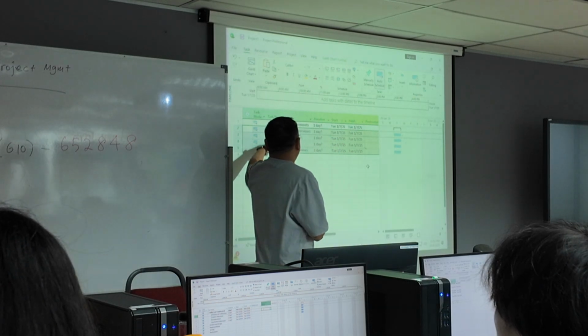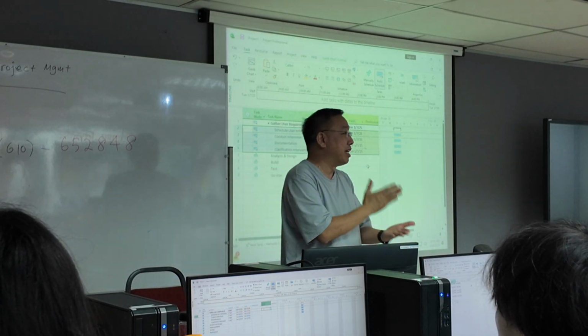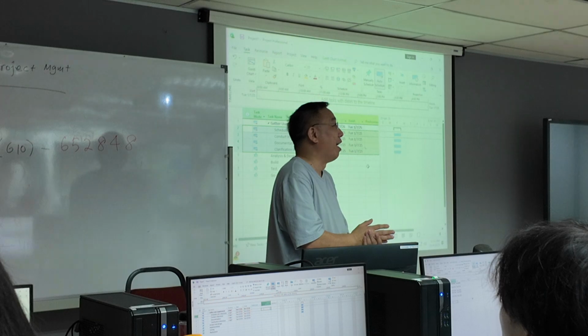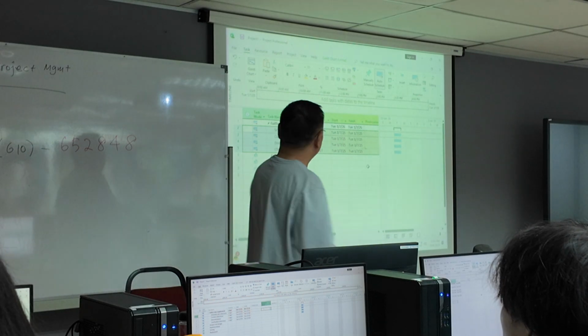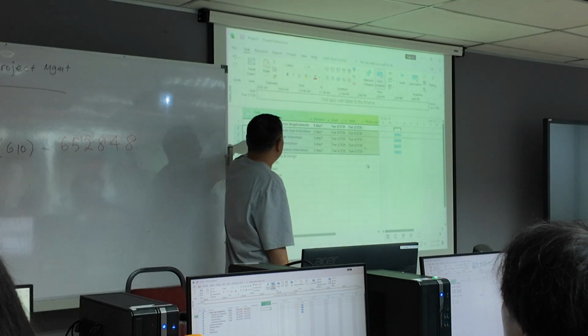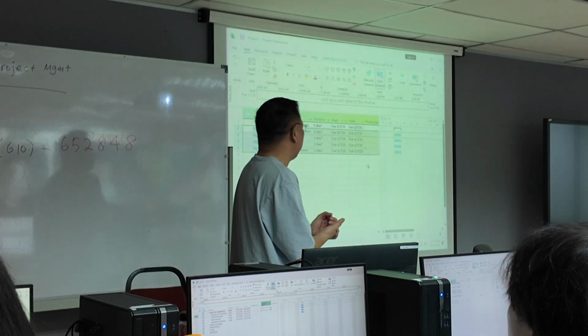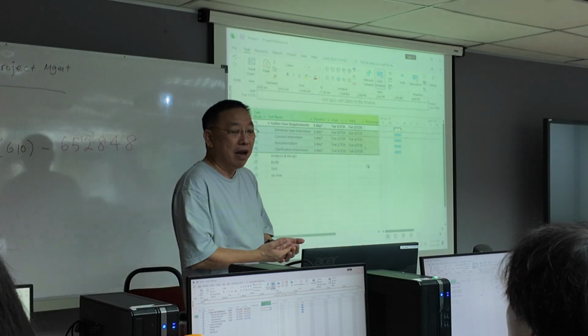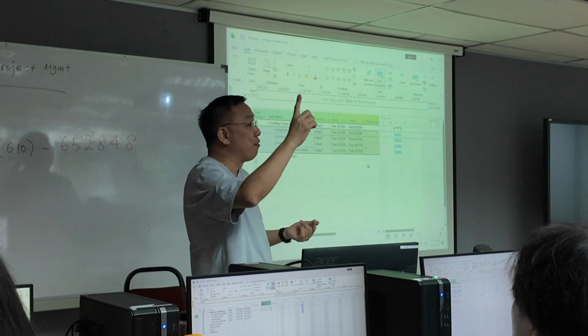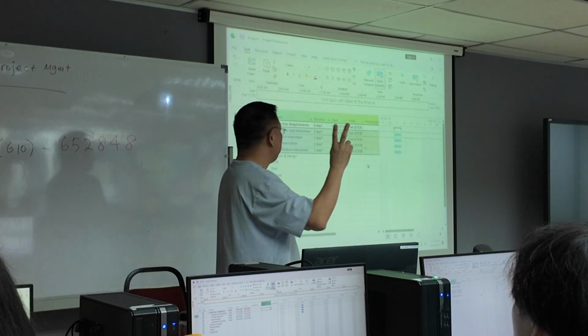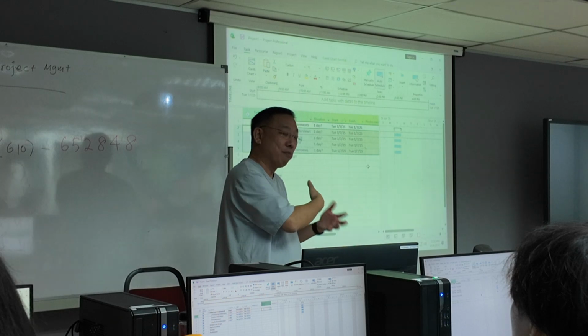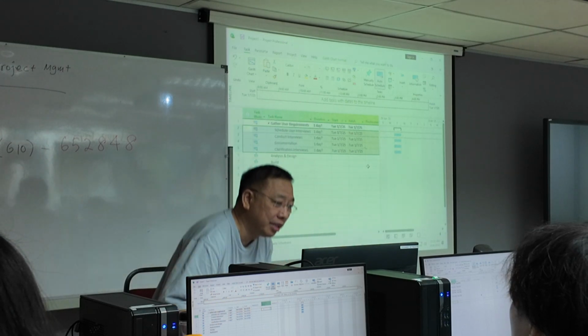Can he do all 4 of these concurrently at the same time? No. How is he going to split himself into 4: schedule user interviews, conduct interviews, document, verify interviews? He can't do it all at the same time. And because he can't, he has to do it sequentially because you only have one business analyst. If you have 2 business analysts, then yeah, you can. You can put in 2 business analysts, and we'll show that later.